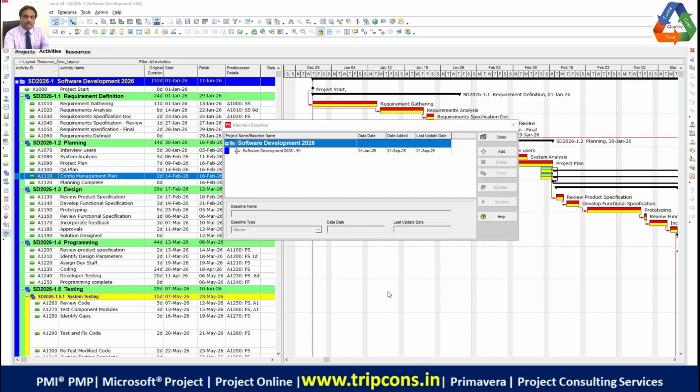Okay, so that is okay, because if you have a project which is normal, which is not going to face any kind of drastic situation, not from the client, not from the weather, not from the climate, so you should be able to finish with one baseline. Okay, but nevertheless, Primavera lets you create infinite baselines. MS Project lets you create 11 baselines maximum, right? But we don't need that really, guys. We should basically be very, very good in controlling. So click on the close button.